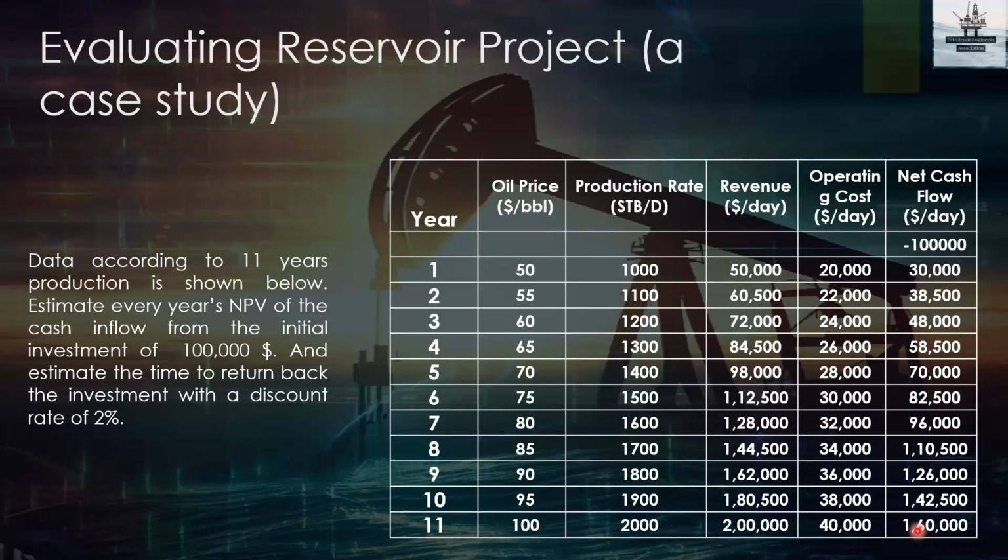That is, in what year you can completely pay back the amount that you invested. After that, whatever income you get is profit. Imagine you are able to pay back in the third year; then all the remaining income is profit, so you start to witness profit maybe after the fourth or fifth year. From that year onwards, the company will start generating profit. If it keeps increasing, the business will progress forward. We are going to estimate the payback period, the year at which we completely recover the invested amount.